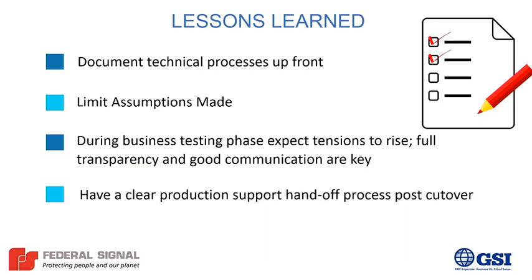An issue we had here was we had somebody who was a business analyst for some time and now is in a functional role in the company. And when they were a business analyst, they knew that there was this fix program that was created back in 2008 to fix this thing when the records came out of alignment. Yeah. And what happened was, he had the problem, he ran the fix program, no problem. Well, the other company's like, I can't approve this because the program's broken. They just didn't talk, they didn't know. And so this guy's for sure that the upgrade's not going to work and it's going to shut them down and we can't invoice, and this one's like, we don't have a problem here. So a lot of coordination.